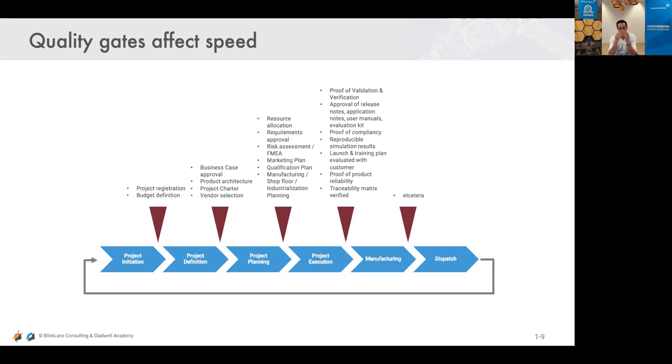over time. And usually what you see is that there are a lot of practices and activities done in order to make sure that we do not continue with development before we're really sure that whatever we've been creating is tested, approved, agreed upon, complete, etc. In itself, that's okay, because the quality gates are there to protect us from unintended expenses later on. But these gates reinforce themselves, which means that over time they become larger and larger. Therefore, more documents are requested and mandatory, and more effort is needed to even get through that process step.